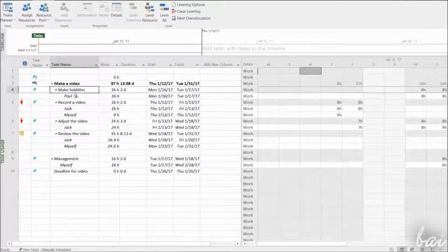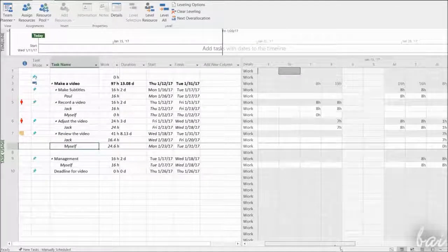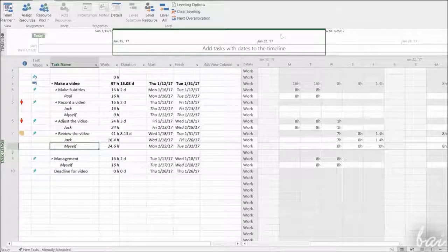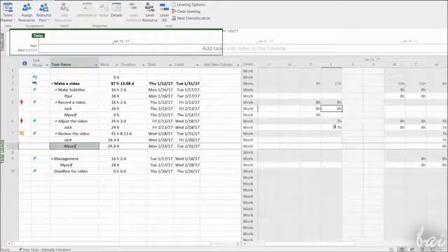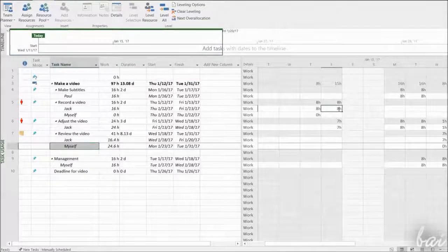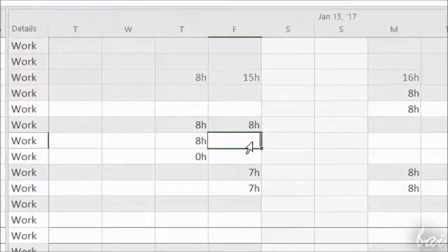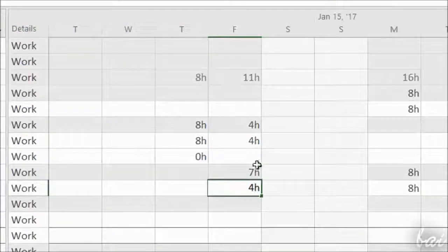If you go to the Task Usage workspace, you can check day by day the total working hours per resource for each single task listed. By default, each resource can work a maximum 8 hours per working day in total. If you assign more than this amount, the resource will be over-allocated, as the red icon on the far left suggests. In this case, you have to spread the working hours through different resources or tasks in order to reach the maximum 8 hours. You can change the hours by selecting the cell and typing inside.